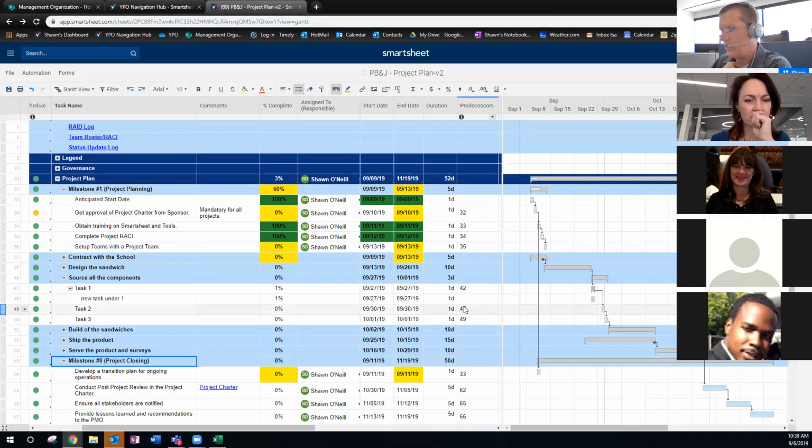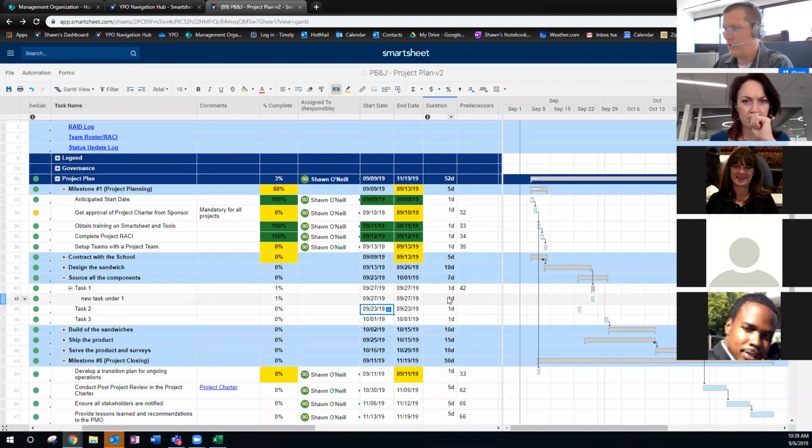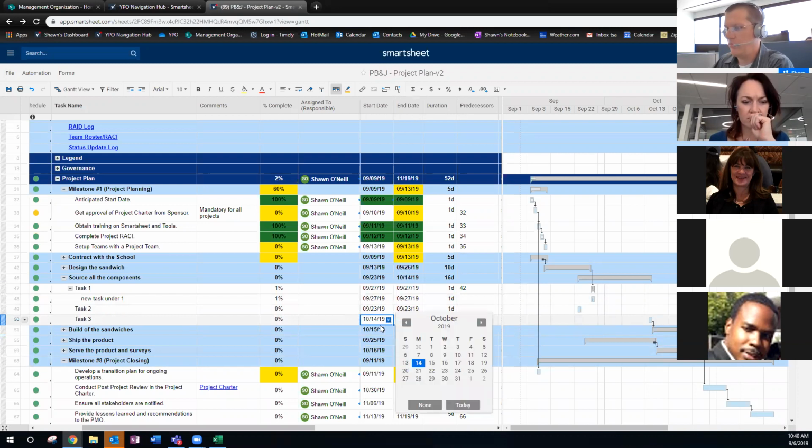And what it will do is also allow it to shift. So like this guy here says he's dependent on 40, this one here. But if it wasn't, if I got rid of that, those tasks are no longer dependent, those arrows go away, but also that allows me to shift this earlier. So if I shift that to an earlier time frame, that would work too. By making that an earlier time frame, or that's a later time frame.